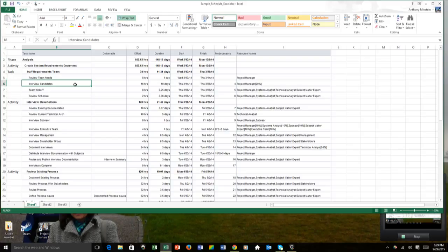I may want to space them out, so I do, in this case, 2 interviews a day. It may not be feasible to get the number of candidates in at a time that's conducive for me back to back to back to back. They may have to interview around other positions or other work that they're currently doing. So duration and effort work in concert with one another.